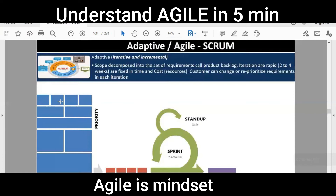Once the priority has been set — one, two, three, four — the development team takes user stories starting from number one, whatever they can complete in a duration of two to four weeks. In Agile, scope is not fixed but time and cost are. This time period is known as a sprint or iteration. The development team then breaks down the user stories into small tasks and makes a sprint backlog out of them.